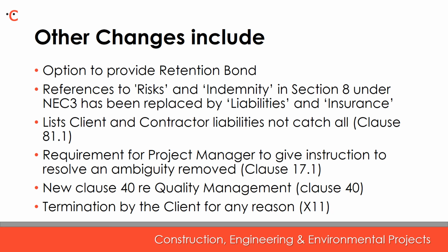Finally, I just wanted to have a quick overview of some of the other changes that we've identified. It's not possible to capture all the changes in this talk, and more will no doubt come to light as people get to grips with the contract and using it in practice. However, we will highlight a few of these changes that we think you should be aware of. So firstly, secondary option X16.3, which deals with retention, now includes an optional provision to provide a retention bond rather than the retention of money or cash.